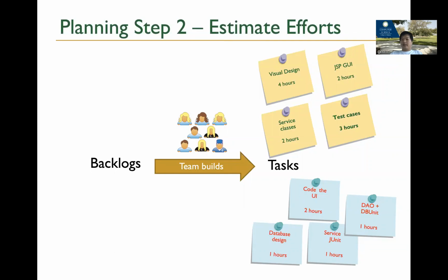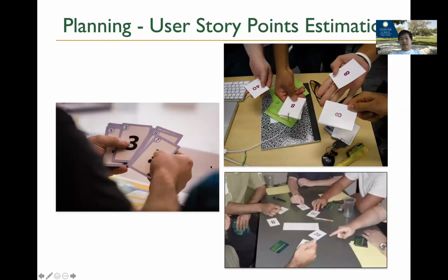So that's why I was asking, the most challenging part here is how you can figure out these numbers. Because you might think it's very difficult, or I think this is very easy, right? A lot of teams actually just ask everyone to vote. When you vote, obviously you don't want to say it one after another. If one senior guy said it's 1 hour, nobody else is going to say it's 4 hours, right? So everybody shows their number at the same time. They use poker cards, number cards, and tell what number they think the hours are worth, and how much time it's going to take. Or sometimes they just show fingers together, to see if people agree.